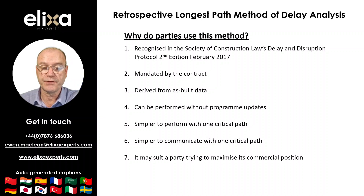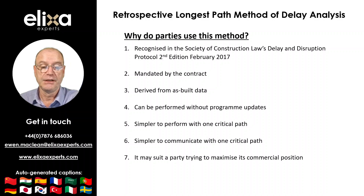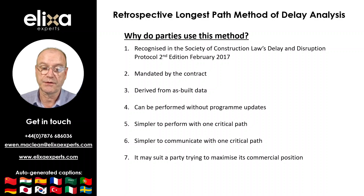It may also be beneficial for one party to use the retrospective longest path method of delay analysis to maximise its commercial position by advancing a position that relies upon the as-built critical path and bypasses the actual or contemporaneous critical path as it suits the case to do so. There is also a potential to exaggerate the duration of delays as discussed earlier. In summary, if the circumstances are appropriate without switches in the critical path, then the retrospective longest path method of delay analysis can be a reliable method in dispute resolution when executed properly.